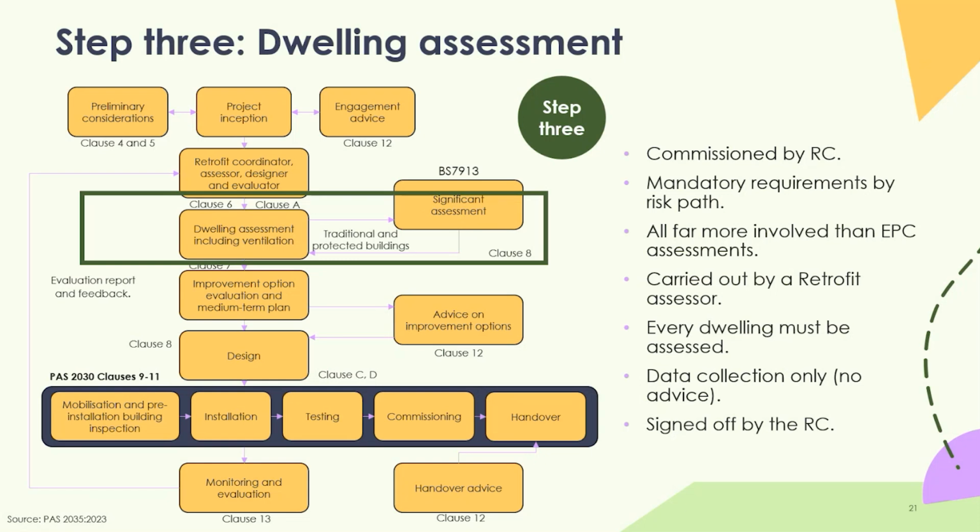Basically, the assessment does generate an EPC type energy model, if you like, although because it's not lodged with the EPC register, it's not actually an official EPC. But as I say, every dwelling that's going to be retrofitted does need to be assessed. Repeating again that it is a data collection process only.